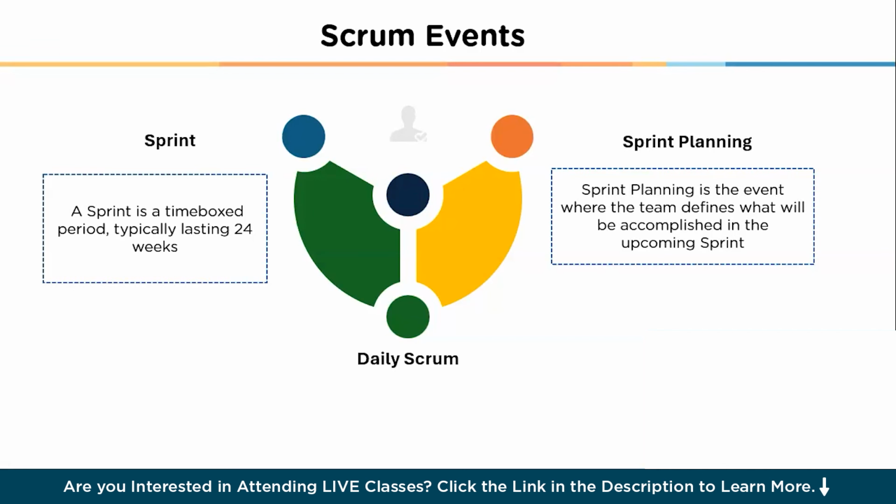During sprint planning, the team breaks down the selected backlog items into smaller tasks and estimates the effort required. This detailed planning ensures that everyone understands the work and how it contributes to the sprint goal. Sprint planning sets the stage for a focused and productive sprint.